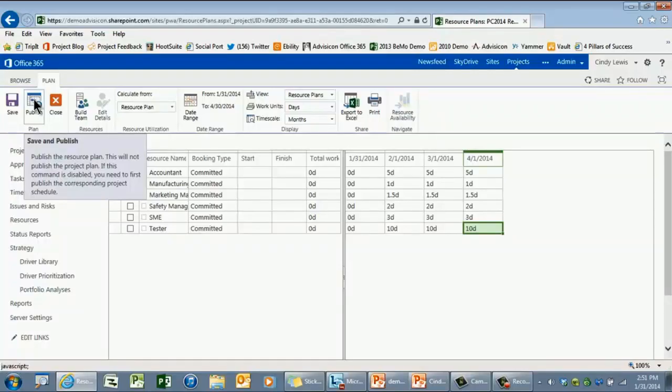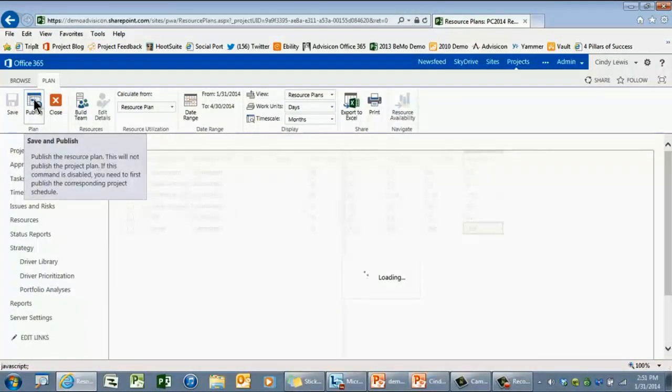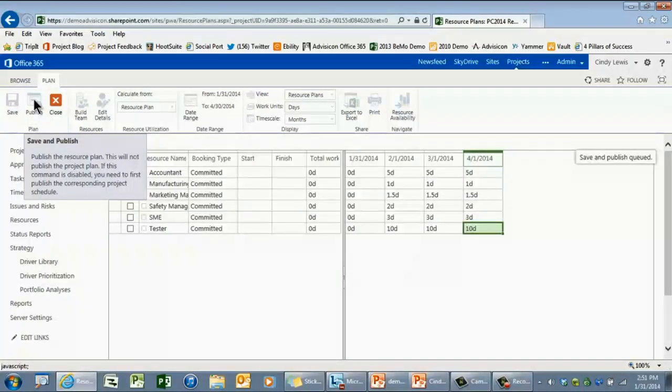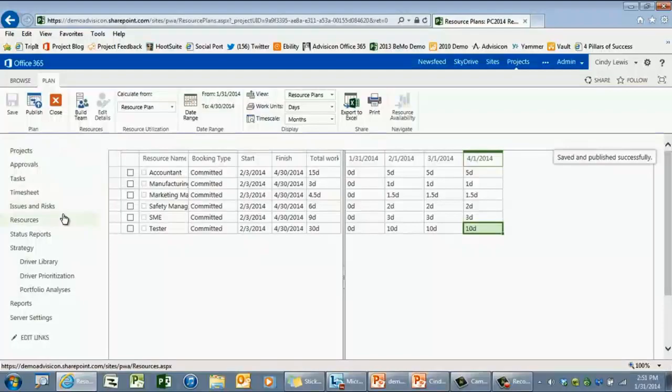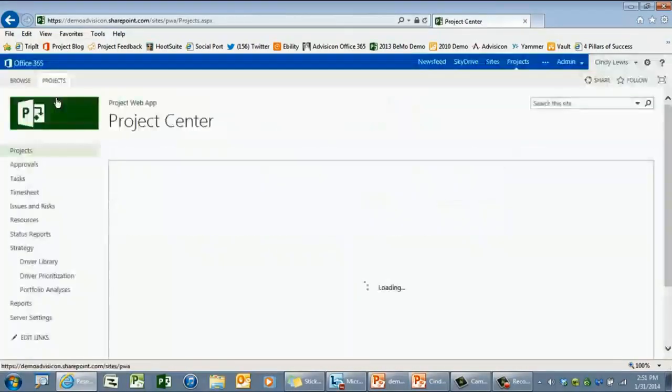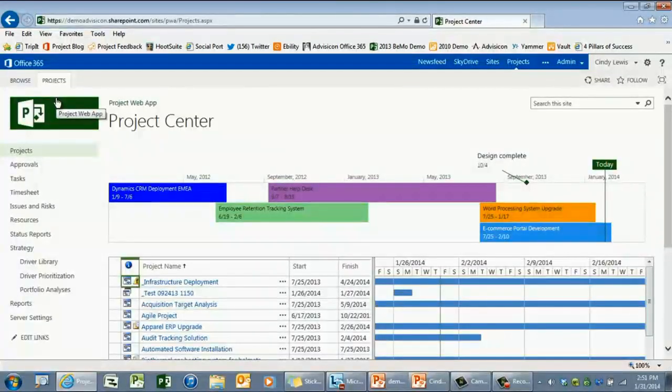What customers have been saying is they didn't realize there was this high-level option to plan work. They were always going into a deep dive in the schedule, and they didn't have the schedule details. But for operational work, you might just know what you did last year. Customers that have a ticketing system said they were able to forecast it's about 10% of someone's time. They can do that in this system with a resource plan where they don't have to dive in.